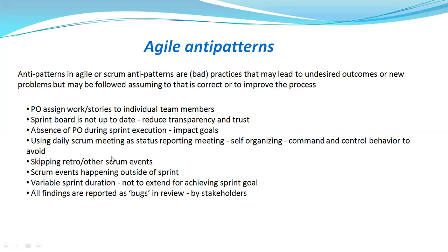Next, variable sprint duration. This happens in a few teams. That means there will be a variable sprint duration. Always remember, a sprint is a time-boxed event and we cannot change the duration of the sprint. So if you are doing so, you are following a wrong practice. That means following an Agile anti-pattern.